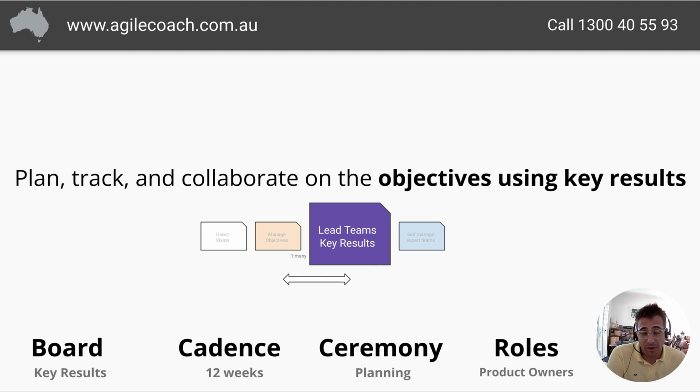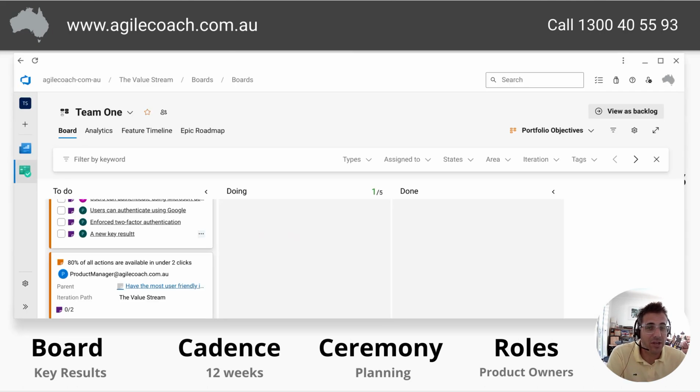Once you've done that, though, then you would plan them. So this is a lot more collaborative with the objectives. So you can refine as much as you like. You probably do just what you think is going to fill the quarter and a bit more, as opposed to the planning, which is really saying, well, how many of those can we get done? Now, when you come to doing the planning, the refinement should already be done. So you refine 6 to 8, and then you go and plan them.